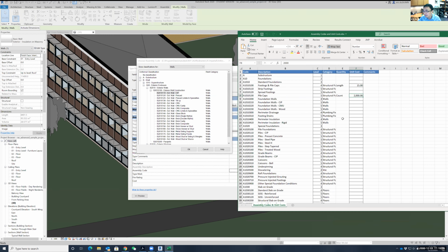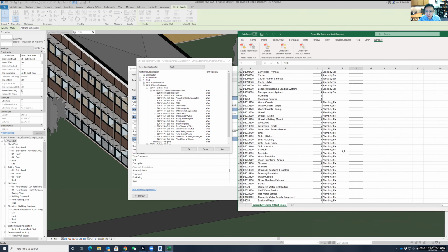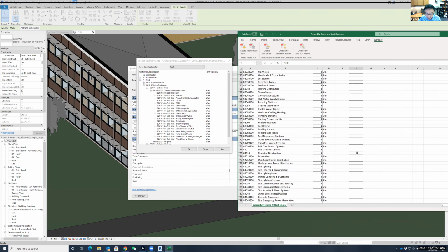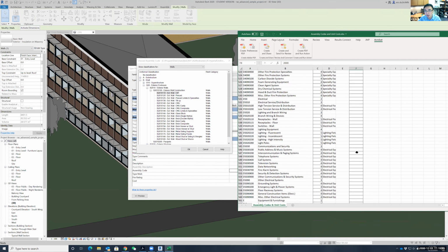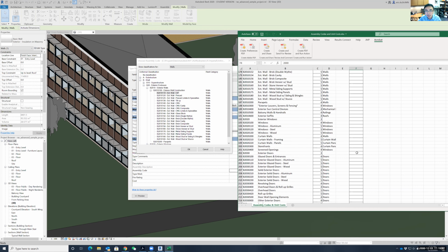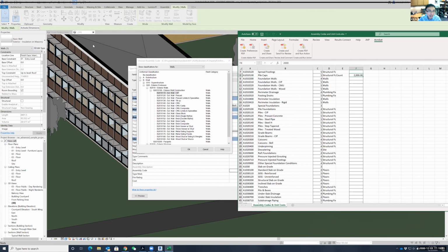Anybody? Okay. So if you check, there are so many line items here. If you had to fill in all the unit prices, I think it's around 700-something. Yeah, 800. That would take forever. We don't want to do it. For this particular project, we are only interested in assigning the unit cost for whatever items are in this project. So that's what we want for this project.